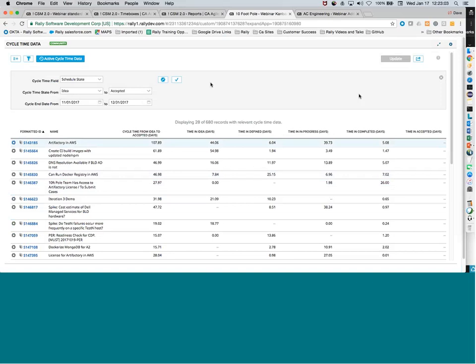So team members that have less capacity than the amount of work are at risk of not being able to complete that work. Not having a capacity set doesn't help as well. That way you don't know what this team member can take on for this particular sprint. So being able to know what the user has committed to, and the amount of work that is currently available to them, you can do the load balancing.